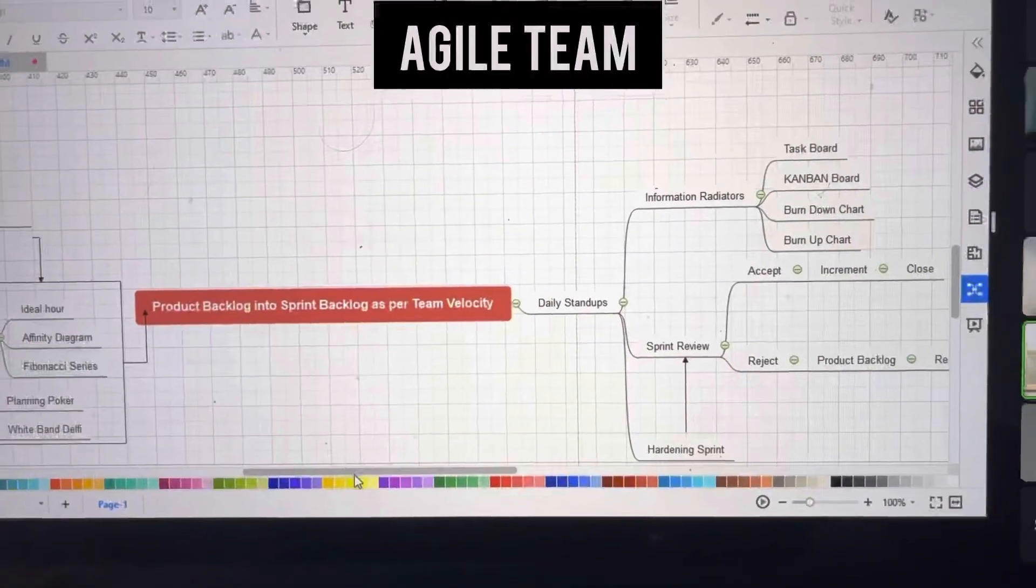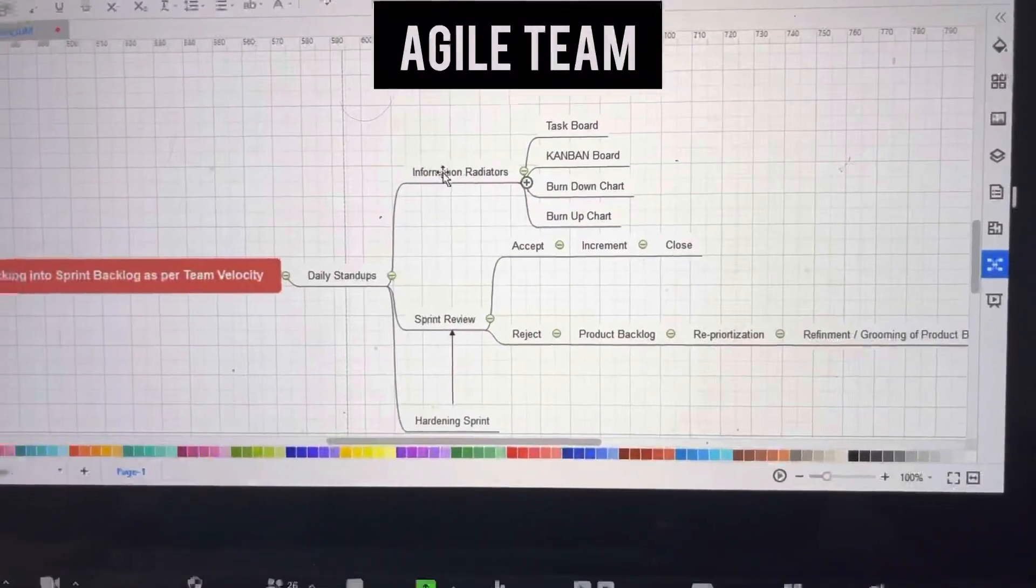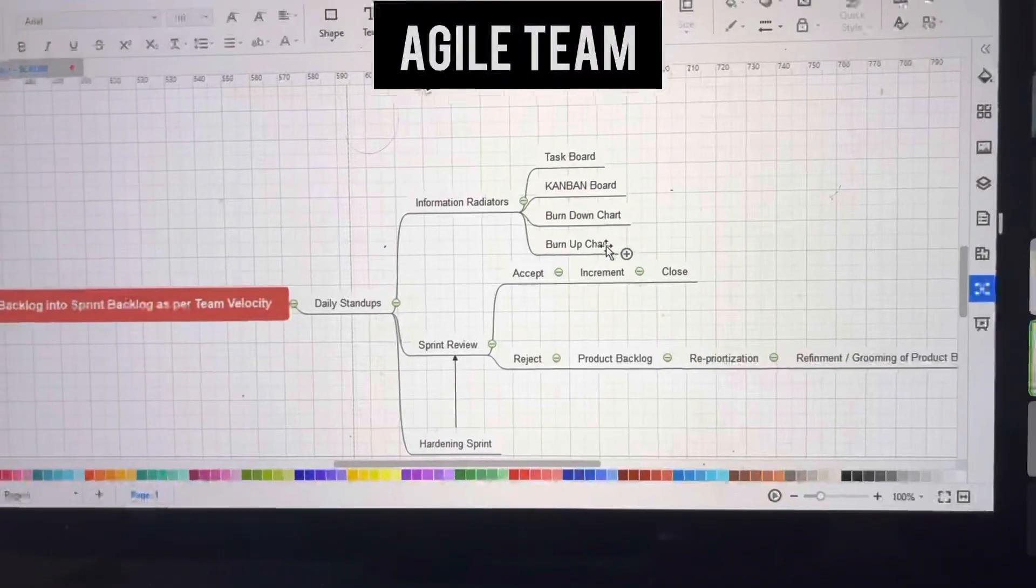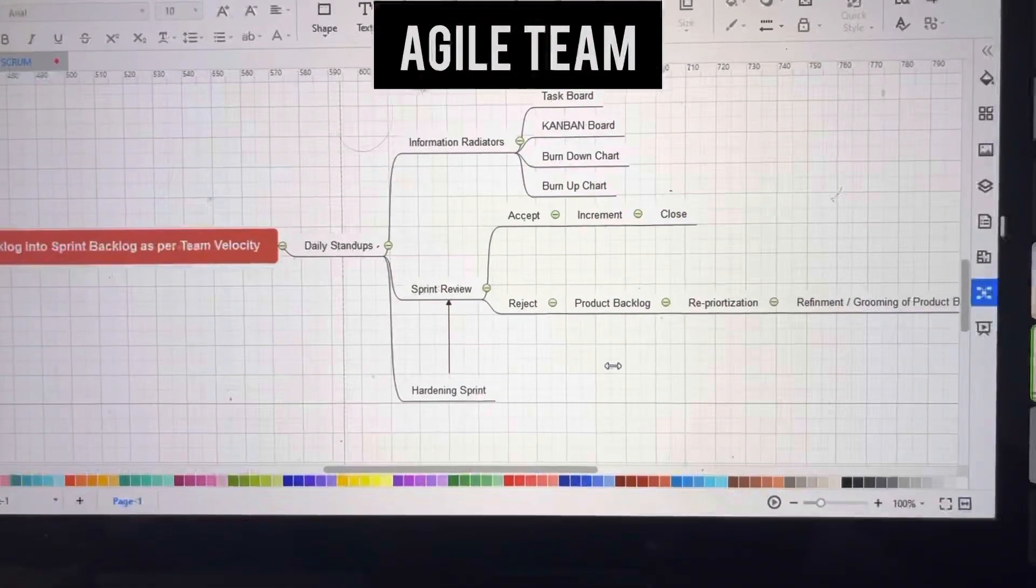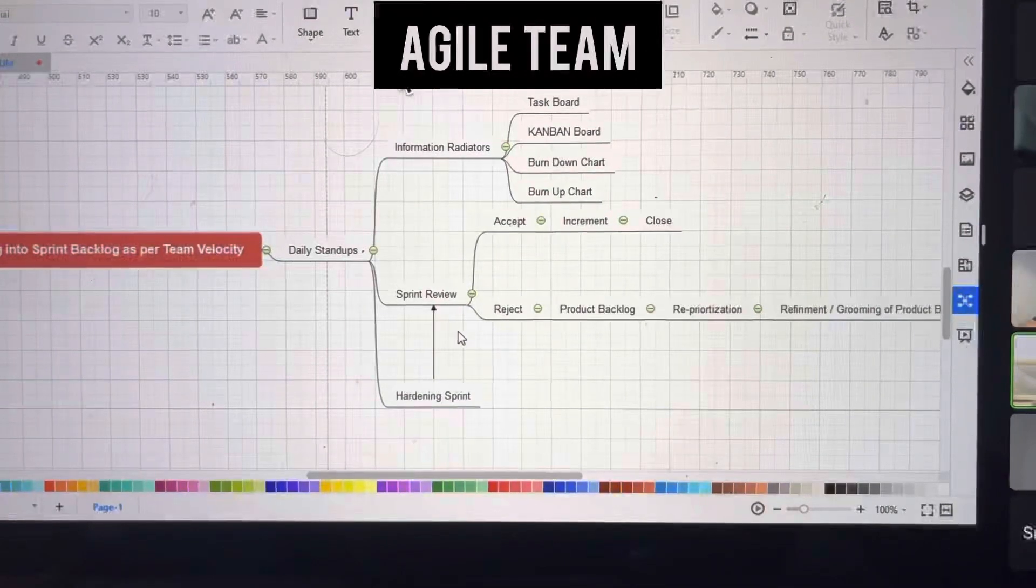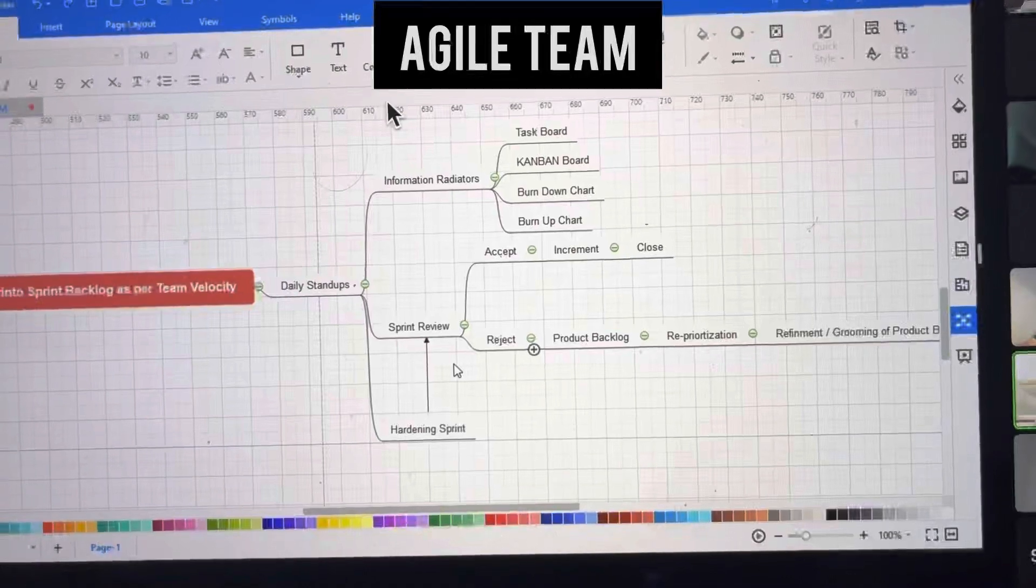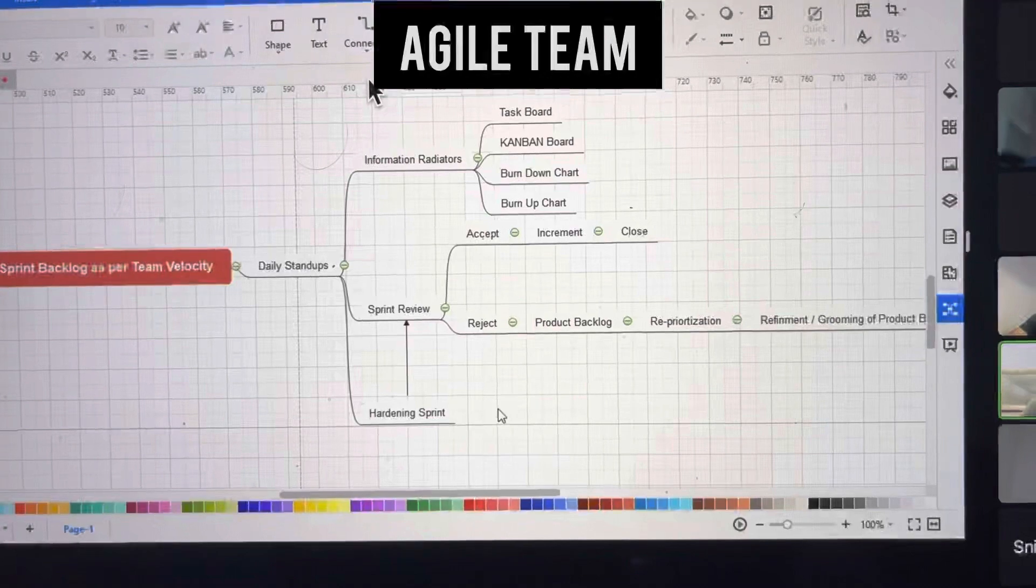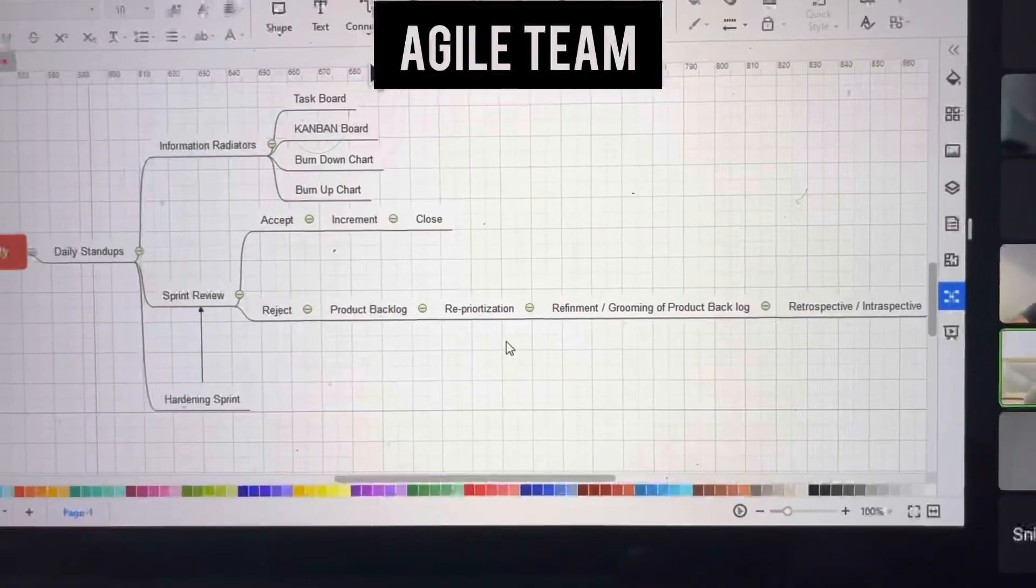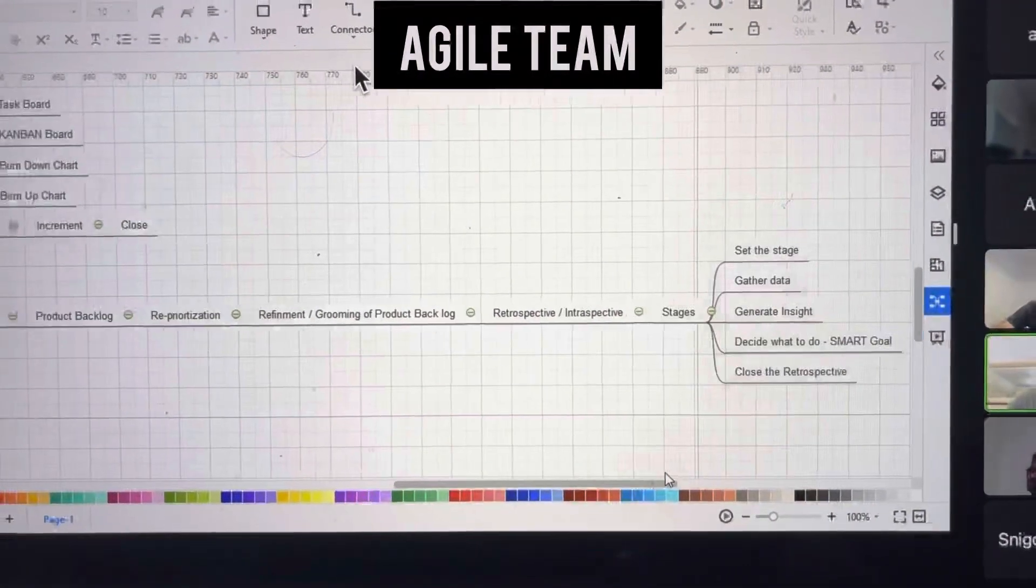The product backlog is changed into the sprint backlog based on sprint velocity. Daily standups are held where information is radiated through task boards, kanban boards, burn up charts, and burn down charts. After sprint hardening, we show it in the sprint review. If accepted, it becomes the increment and closes. If rejected, it goes back to the product backlog for reprioritization, refinement, and grooming.